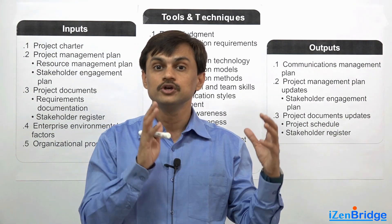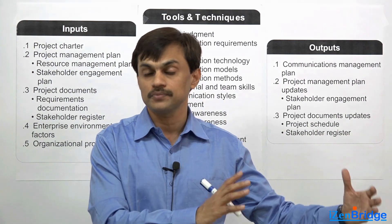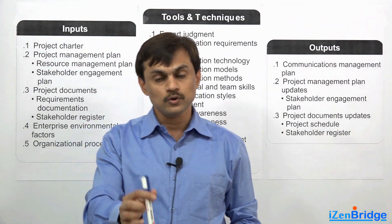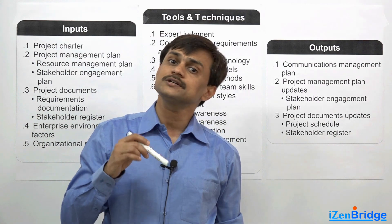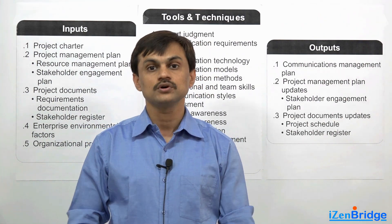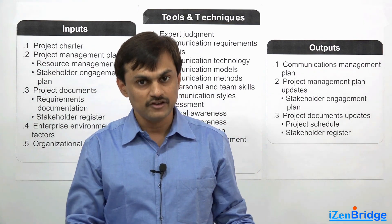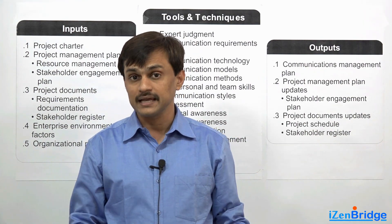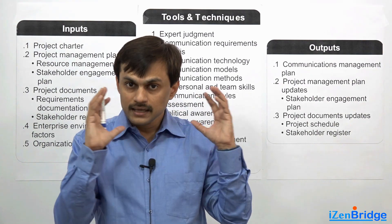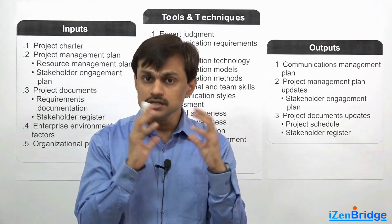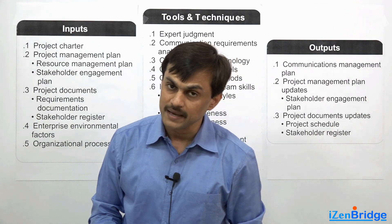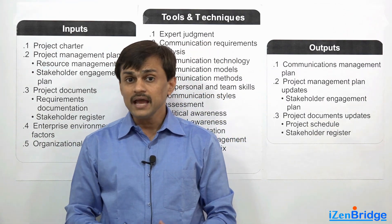At the agreed frequency, stakeholders should know when to expect project details. You should not have a situation where stakeholders are calling you asking when to expect the weekly report. They should know that the weekly report is expected to arrive on Monday by 5 PM, or something like that. All these communication-related expectations get baselined, understood, and agreed upon through the communication management plan.